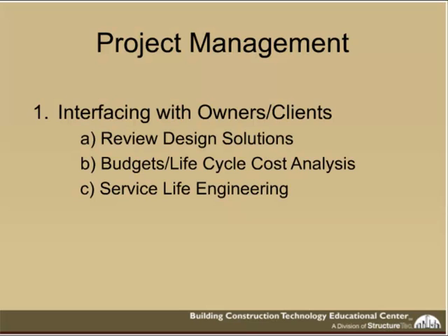And then project management in closing, we want to drive some of these points home. In project management, you need to review the alternative design solutions. There might be 3, 4, 5 different options in design, but once you have those options, you want to review the pros and cons, see what fits within your budget, perform the right life cycle cost analysis. You want to see first cost of ownership versus life cycle cost of ownership to determine what that best solution is for you. And then a very, very important point is service life engineering.